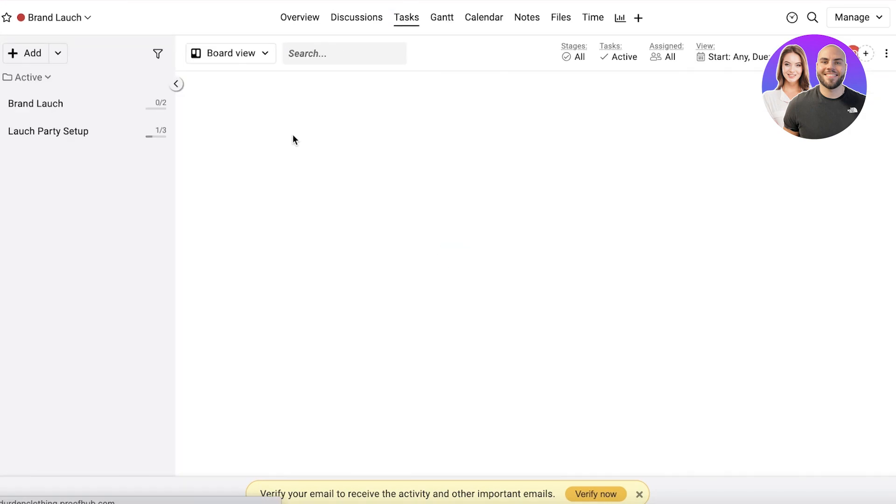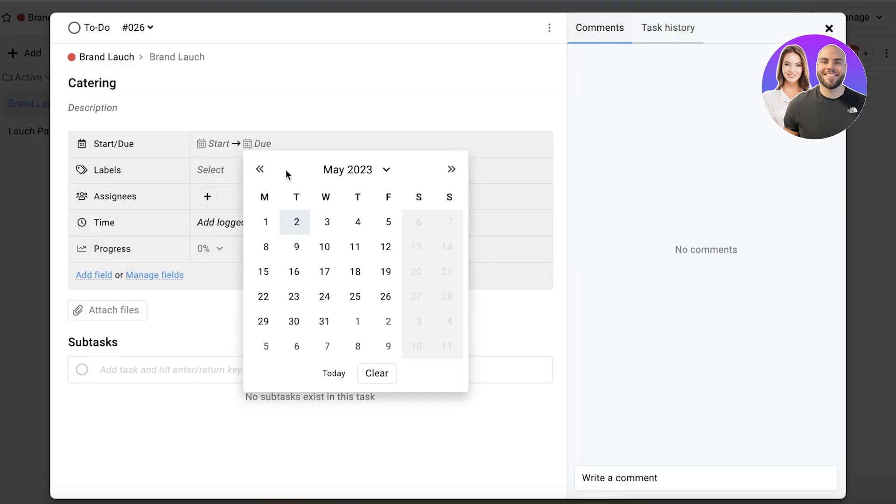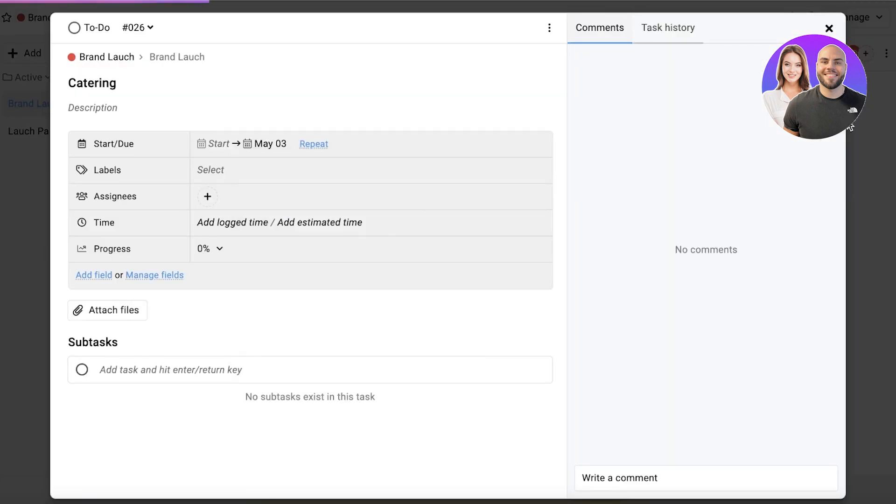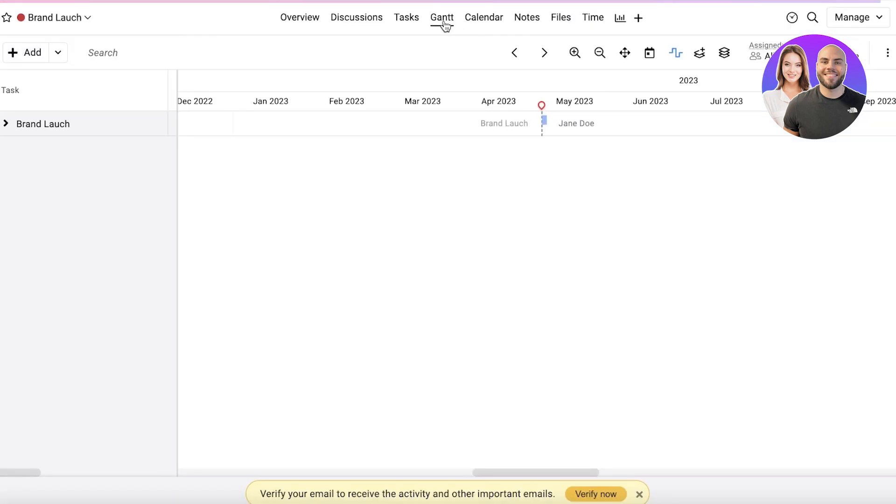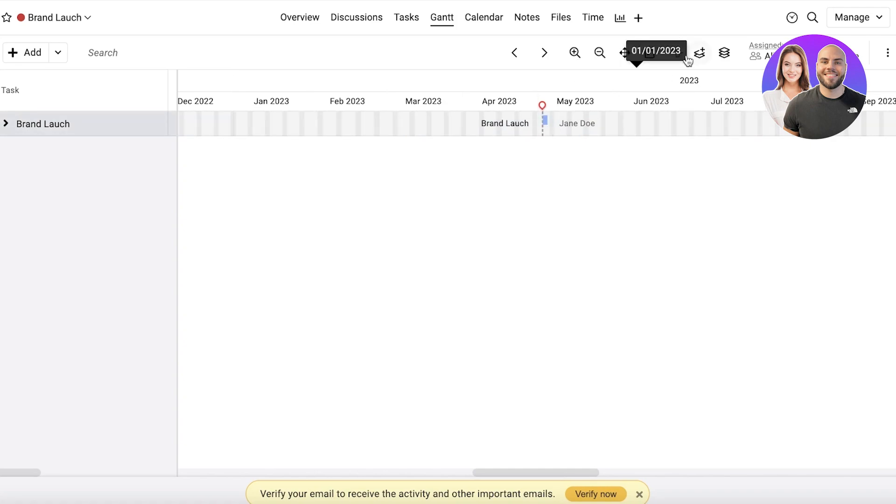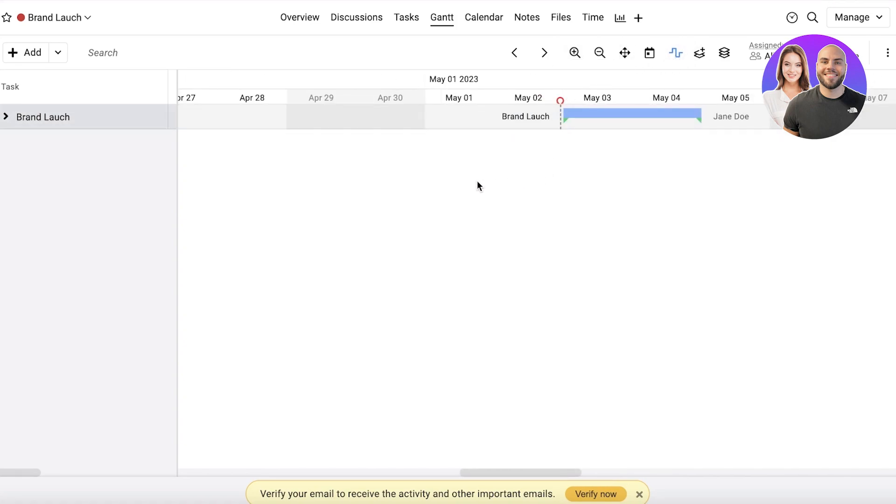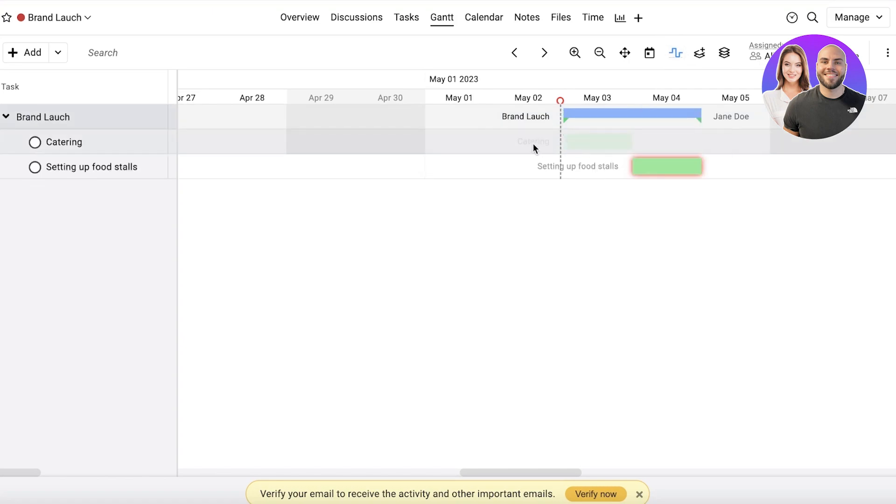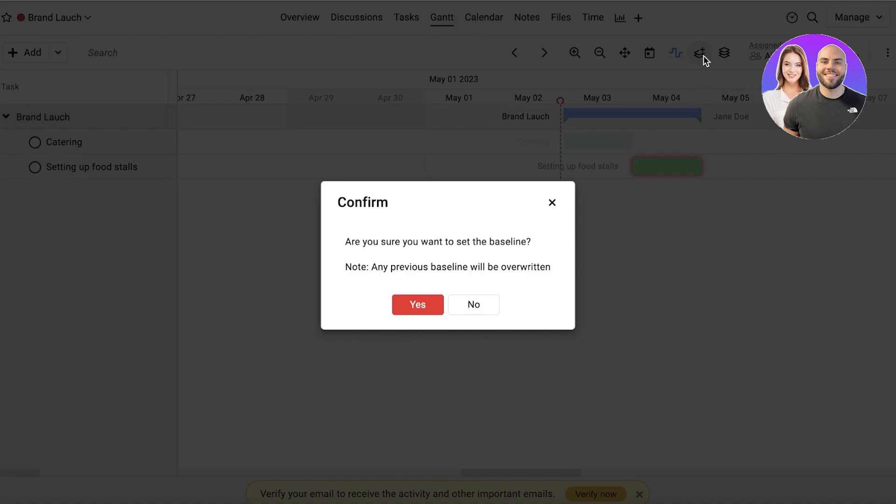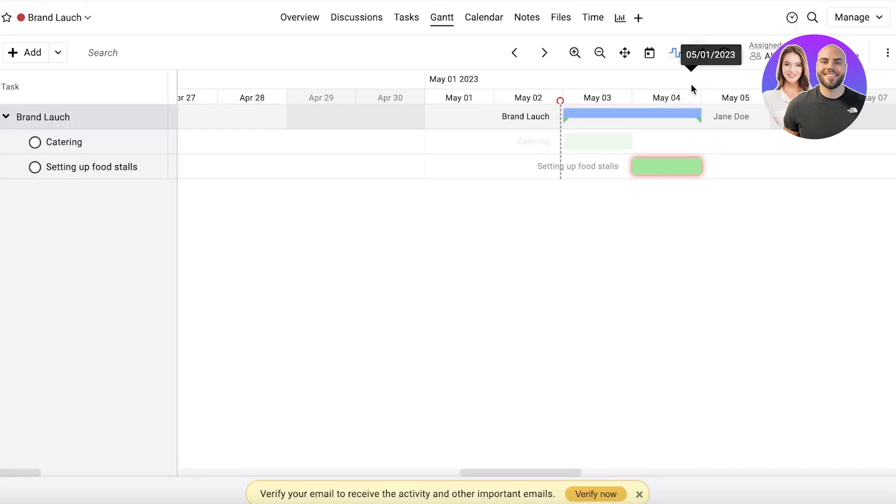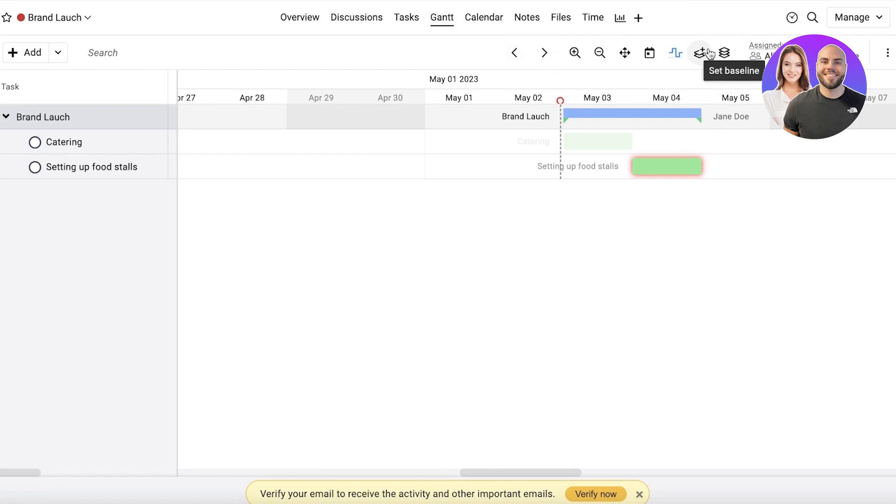Or first off I'm going to add my due dates in this. Like so. And then I can go over here. And I can actually see the brand launch. I will be able to see everything. I can just zoom in to get a deeper view of it. Like so. Now you have an important task. You can go ahead and click on highlight critical path. And you can highlight this to be able to see all the details. And see how everything needs to be accomplished. You can also set a baseline. So any previous baseline that you have created would be overwritten when you do set this up. Now you can also click on show baseline. This just allows you to see all of the work that needs to be accomplished.